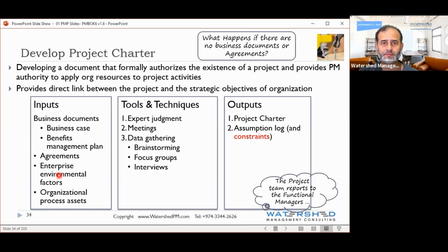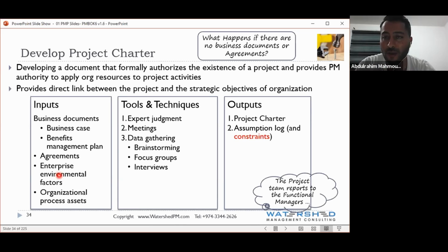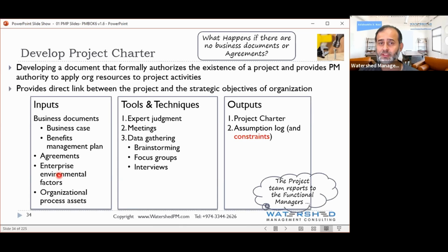Yeah. Like in summer, no projects are allowed to work outdoors from maybe 12 to 5. Affecting your project, so you have to do your own calculation again. Now, who made this rule? We didn't make the rule. Who made the rule? Government. The government says in summer, you cannot work between 11 to 3, something like this.